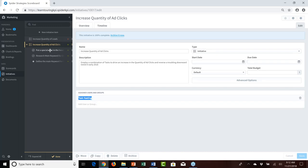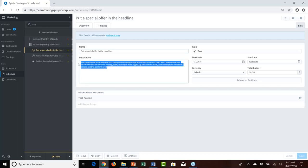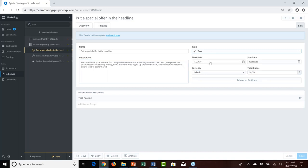We then created tasks to feed that initiative. The first task was to put a special offer in the headline — the headline of an ad is often the first and only thing people see. This was set up as a task with a start date of June 1st, a due date of August 31st, a budget of $20,000, and assigned to T. Keating.